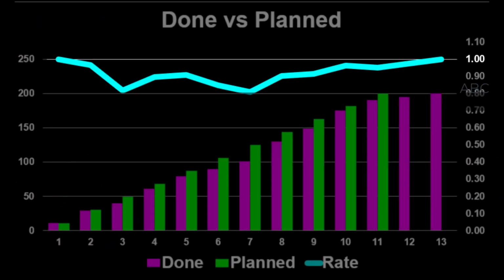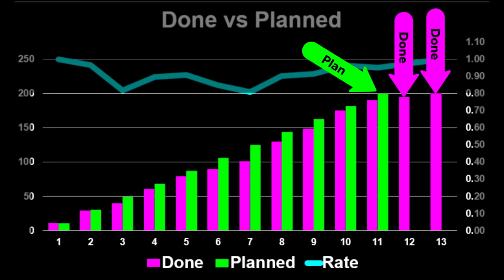Hours, dollars, story points. Lots of us use counts to control schedule performance. But counts can produce nonsense. Here, schedule performance looks good, even though the project finishes late. What's missing is a defined mathematical relationship from counts to time.